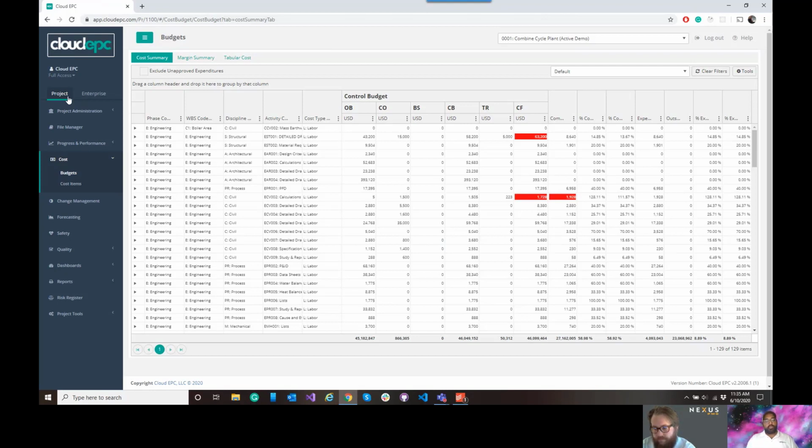And so whether your system is based on or mimics a cost coding structure in a large enterprise system like SAP, or you're creating smart, intelligent WBSs on a per project basis, let's say in a database like Primavera, which is a hierarchical database, what we have the ability to do is take that intelligent coding structure and parse it out into very specific columns.